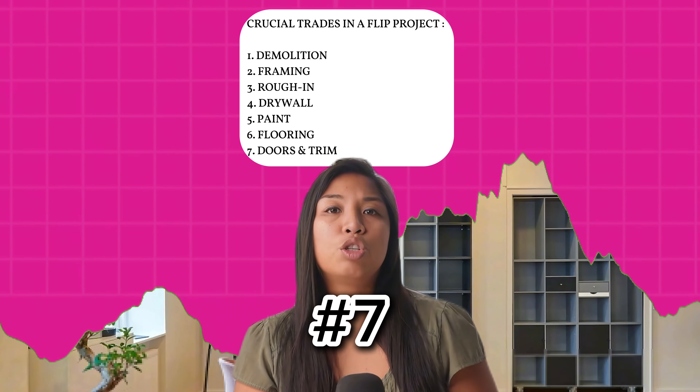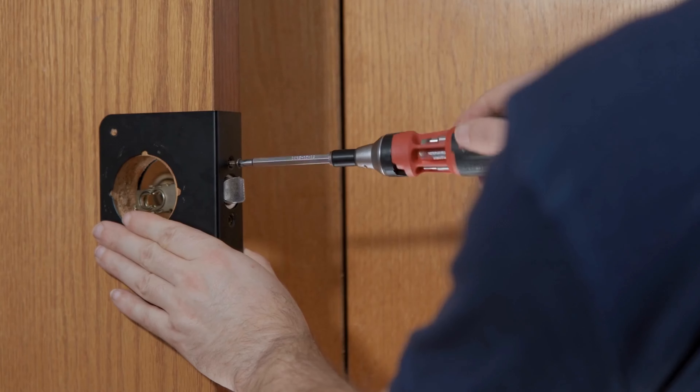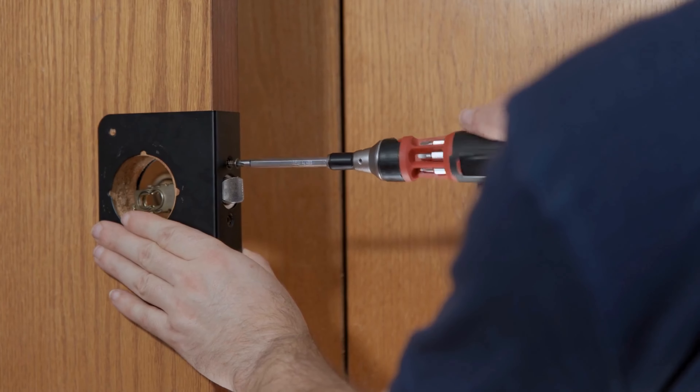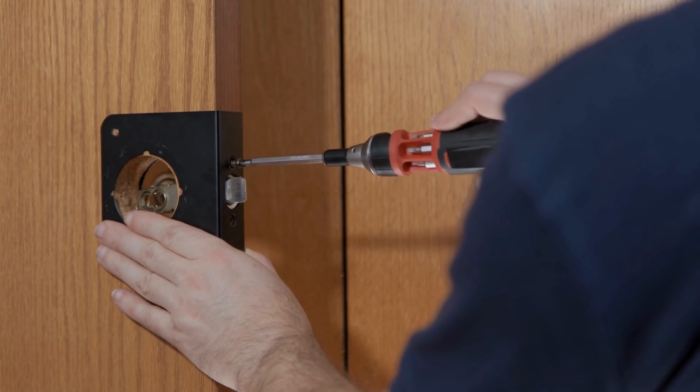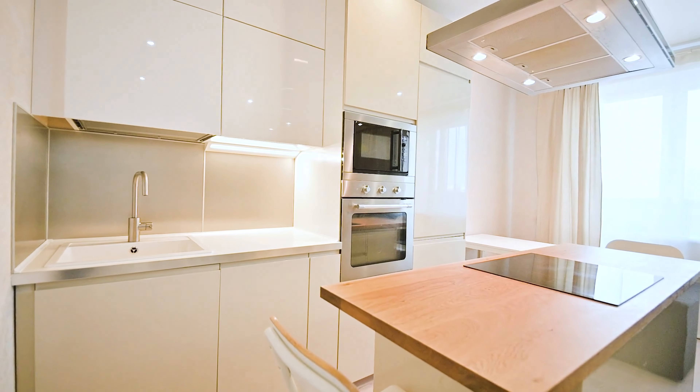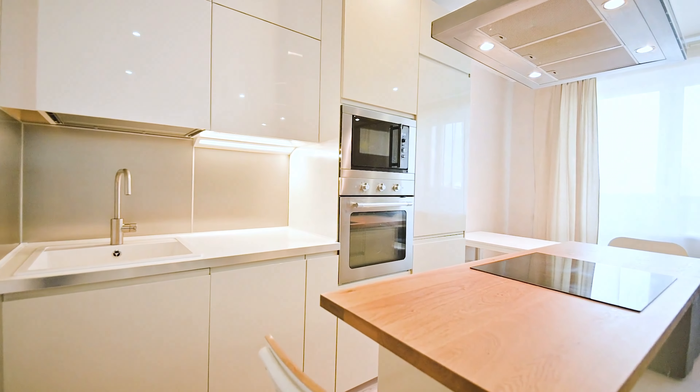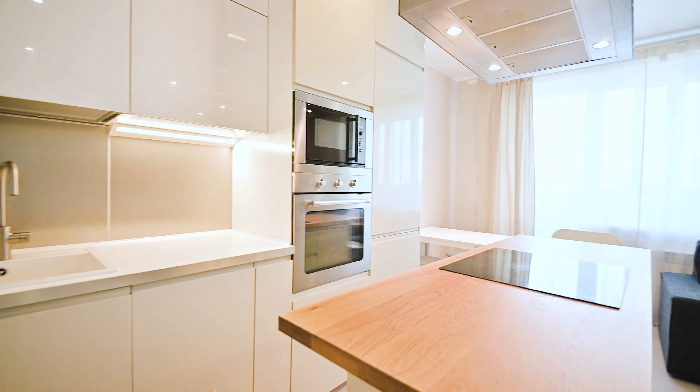Number eight is doors and trim. Remember, these are already painted, so now that you have flooring installed, you're ready to install trim and doors. This includes any crown molding, baseboard, trim around the doors and windows, and obviously installing any closet doors, interior doors, exterior doors, and all the associated hardware. Hardware includes knobs, hinges, and any hardware for the doors will be installed at this time.